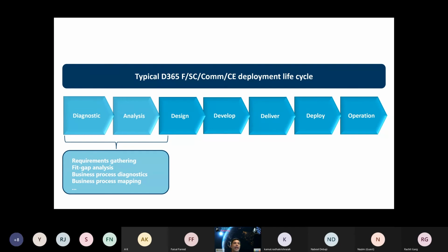Irrespective of what your approach is and what methodology you use to implement these applications, requirements are gathered in the beginning phases of the project. And you do fit gap analysis, business processes are discussed, discovered, diagnosed, as well as mapped to those requirements in the beginning phases of the project, when you're building the skeleton of your bigger program, which may even be a phased project delivery program rolling up to multiple years.